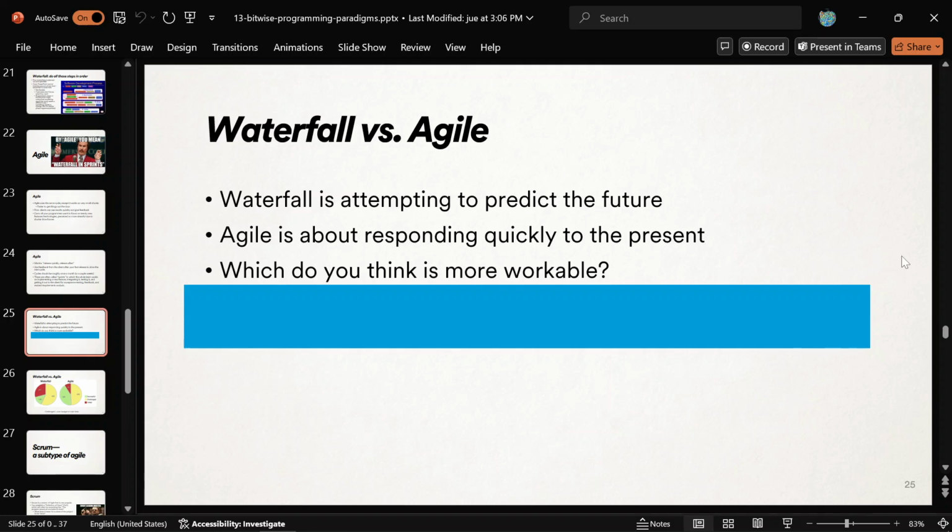That's a very good point. Yeah, exactly. Other comments? Yeah. From what I know, the later in development you notice an issue or something that could be done more efficiently a different way, the more difficult that is to fix, rather than doing the entire system. Absolutely. Yeah. So that's a huge con for the waterfall approach. You have to really hope that they did their design well.